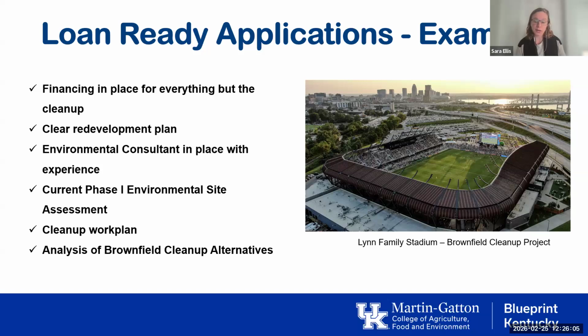So that's a professional that understands what the cleanup is going to require, and they're going to be with you the entire way throughout the process. Kiersten already talked about phase ones. When you do your cleanup, and typically when you approach us, we want to see that you have a plan in place for how that cleanup is going to be done. That's something that your environmental professional can do, and that's also something that can be charged to loans that we offer, and you can retroactively charge expenses as long as they're eligible.